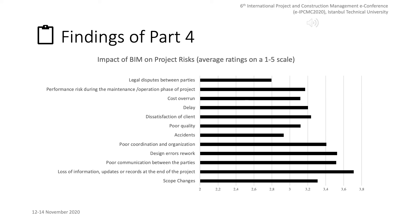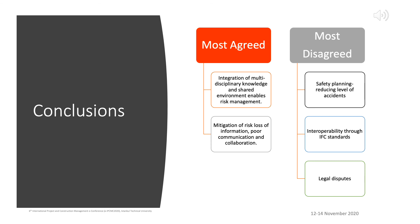Now, let me summarize the research findings and conclude. From the research findings, the most important aspects of BIM are the integration of multidisciplinary knowledge and a shared environment that enables communication and collaboration for risk management. The mediation of risk of loss of information or updates, poor communication, and poor collaboration between parties are aspects mostly highlighted in this research. On the other hand, safety planning and reducing the level of accidents, as well as interoperability through IFC standards, are the most conflicting issues regarding the utilization of BIM in risk management. Some respondents stated that legal risk may even arise when BIM is used in project management. The utilization of BIM, especially for risk mitigation and assessment during the project lifecycle, is seen as useful for experts experienced in the Turkish construction industry.